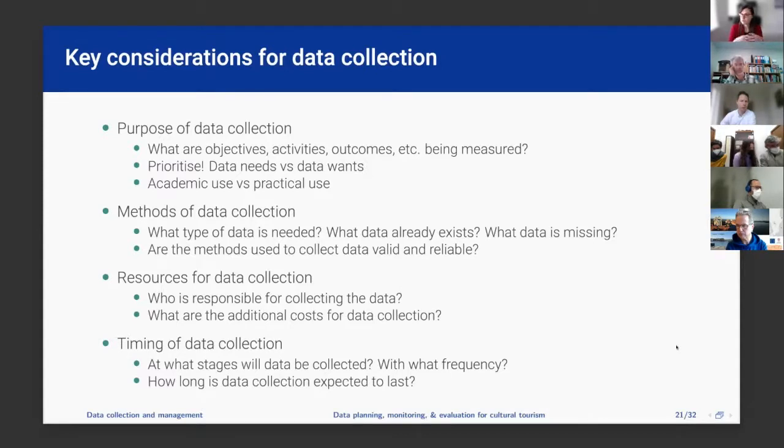In some cases, it's just going to official statistics. It's pretty easy. But maybe, for example, if you're developing a new tourist route, that might be kind of difficult to know how many tourists are going, who's going, what gender are they, what age are they, what kind of groups are they? So in these cases, maybe you need to hire enumerators to go out with an iPad or a phone and go to the path, maybe over a week or so, and just record, just observe and see who's passing. And that's a way of getting data collected, but that obviously comes with extra costs.